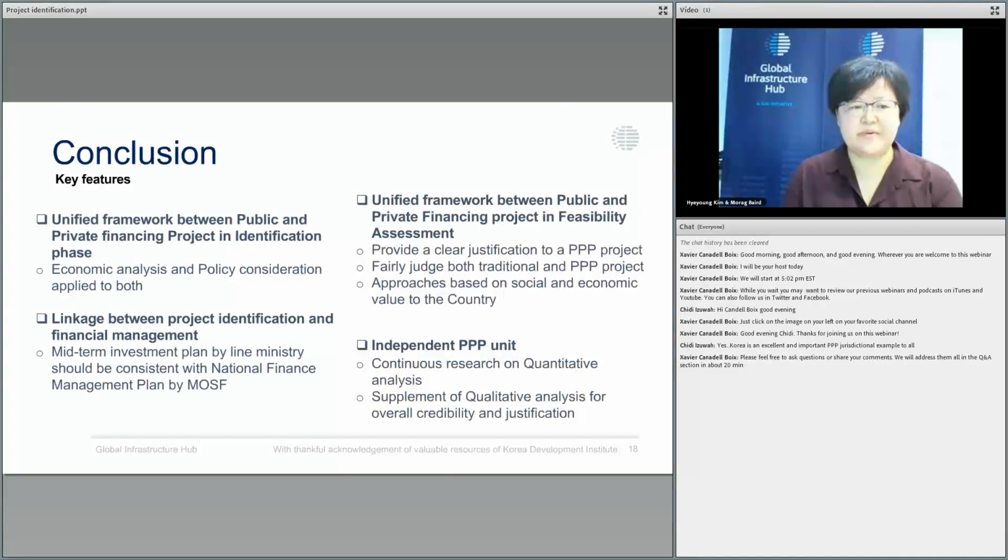So if the VFM assessment is completed, then PIMAC concludes whether this project can proceed to the market as a PPP or not. And this is my conclusion of today's presentation.